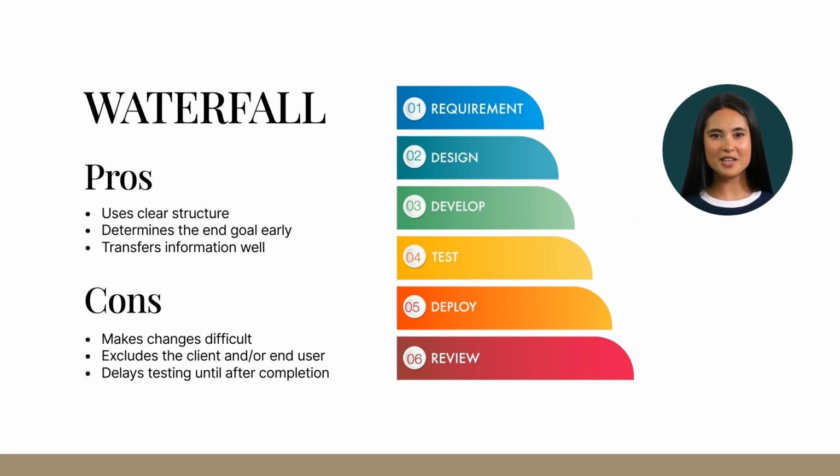Delays testing until after completion. Testing poses a significant challenge in the traditional waterfall approach, as it is deferred until the later stages of a project. Waterfall insists on waiting until the fourth out of 6 steps to conduct testing, which, in non-software industries, could involve presenting designs to clients or performing A/B testing. This delayed testing phase, occurring after considerable project completion, increases the risk of significant delays if substantial revisions are needed.